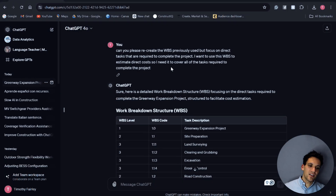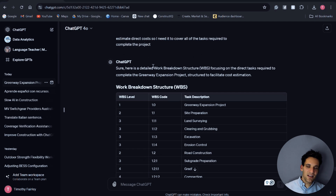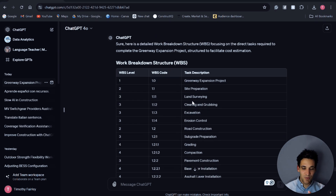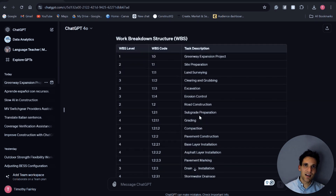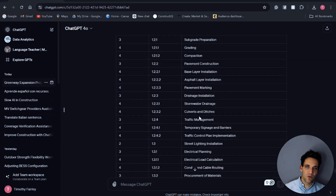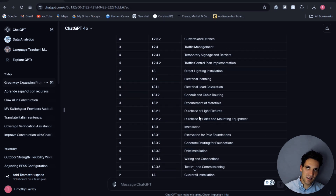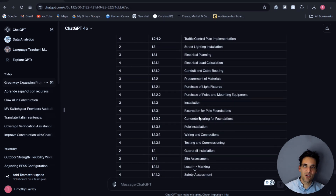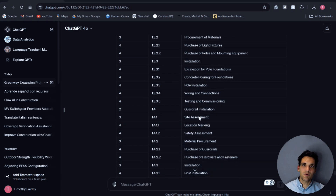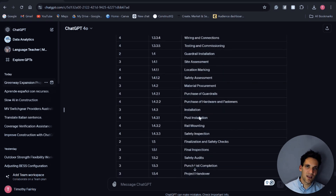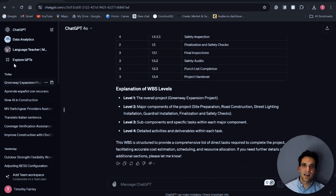In this example, I've asked ChatGPT to create a work breakdown structure for our project, but I've specifically asked it to focus on the direct cost activities — to exclude everything that's not a specific direct cost activity, meaning a task we need to complete to complete the project scope. And it's gone ahead and created this work breakdown structure.